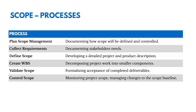The first is Plan Scope Management, where we document how we're going to define and control our scope. Then we collect requirements, documenting the needs of the stakeholders. Then we define scope — taking those requirements and developing a detailed description of the project and the product. Then we create a WBS, a work breakdown structure, decomposing the project work into smaller components. As we monitor the project, we validate scope to formalize acceptance of deliverables, and then control scope to monitor and manage changes to the scope baseline over time.